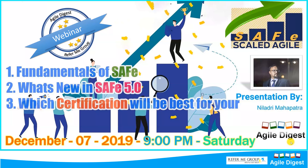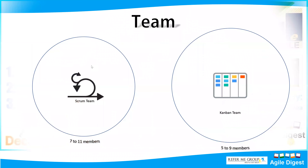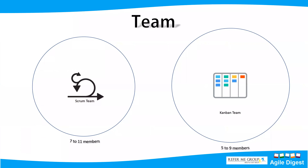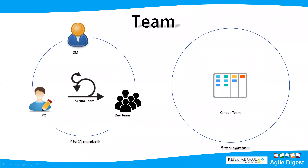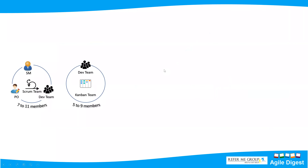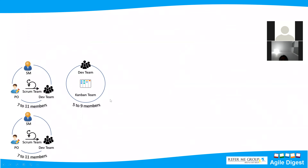Let's begin with the first steps: blending your existing practices within a team and how we can transition to scaled agile. At the team level, you are already working on — or may have worked on — two frameworks of agile: Scrum or Kanban. Scrum typically takes 7 to 11 members. A Scrum team has a Product Owner, Scrum Master, and development team. A Kanban team has a development team, with Product Owner or Scrum Master being optional.